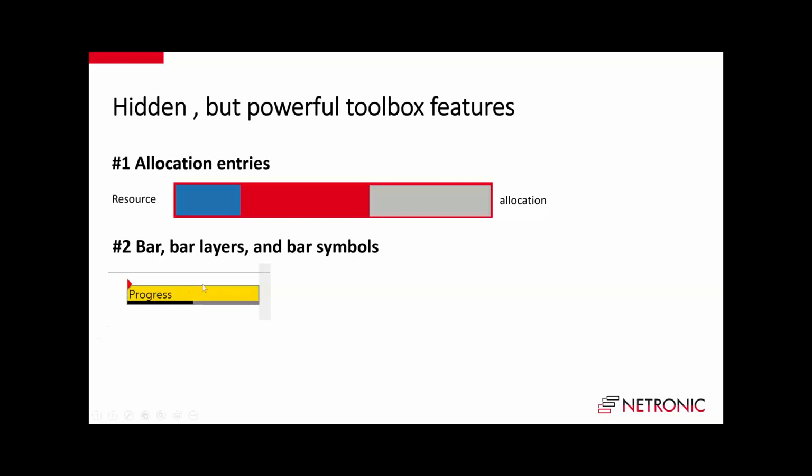This could be your job, or this could be an operation. And then from here, you would see if you get back information about progress. So if this is a project task that runs 3 weeks and the employee booked already 1.5 weeks, you see 50% of this is done, and you could also add a symbol here.